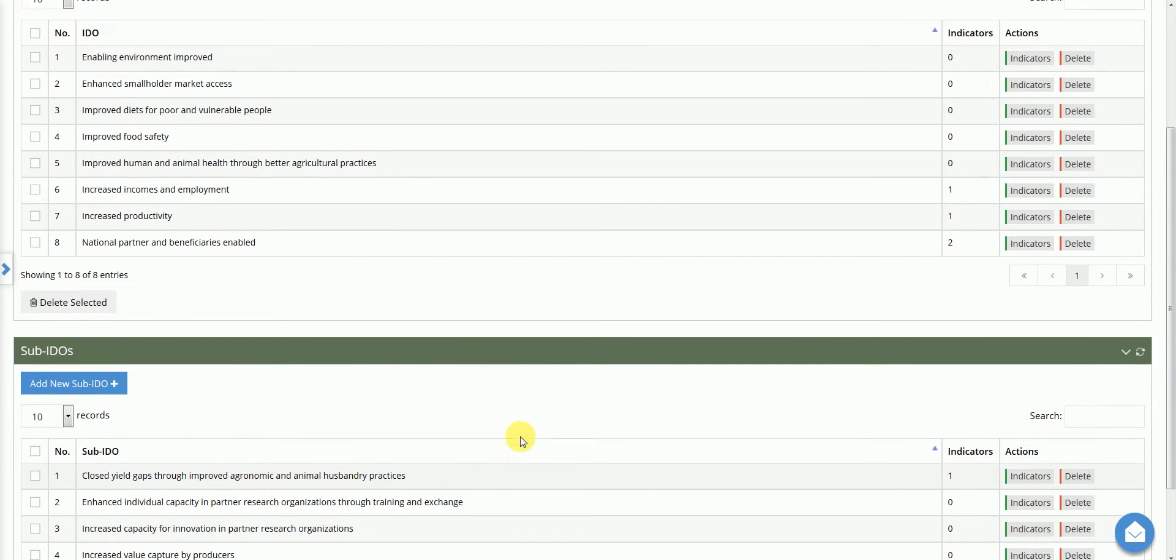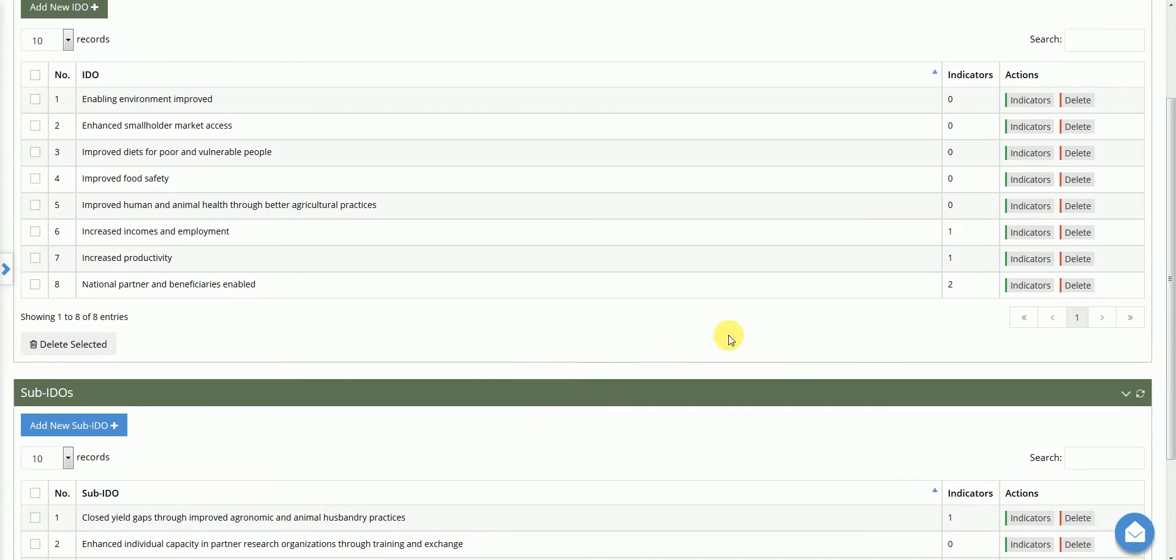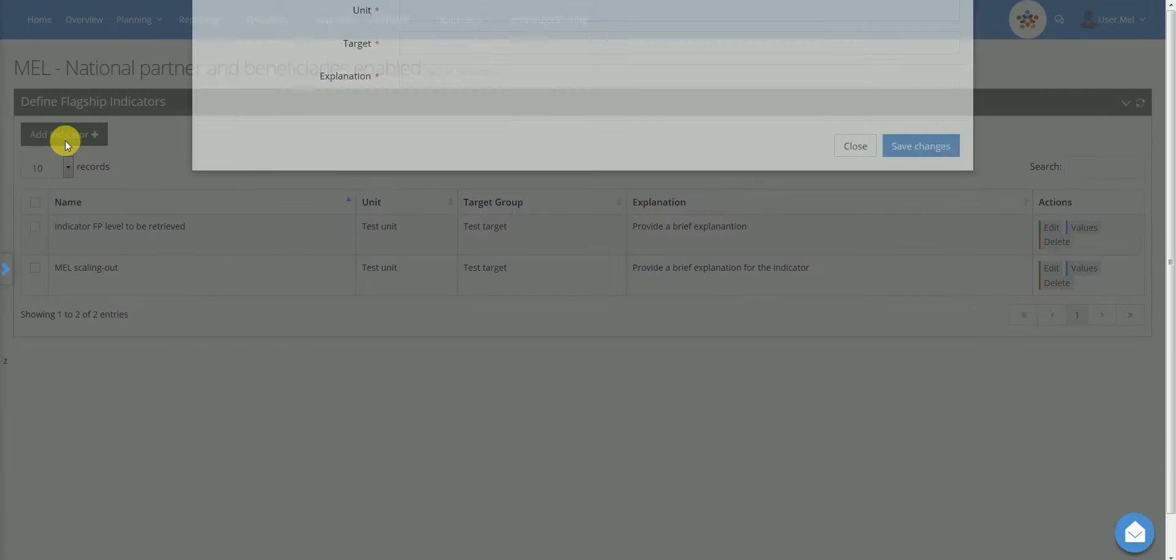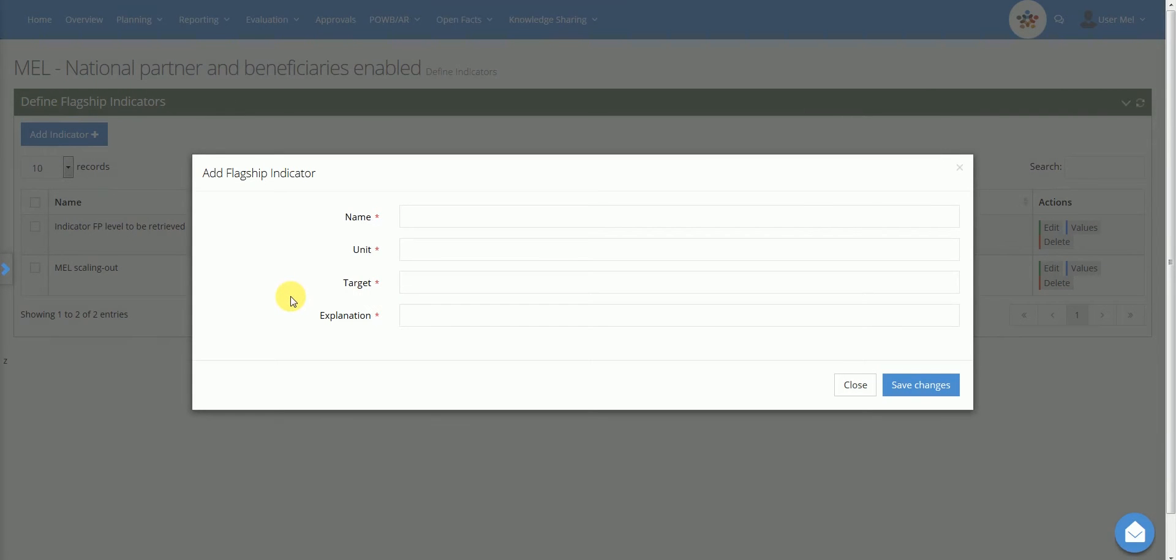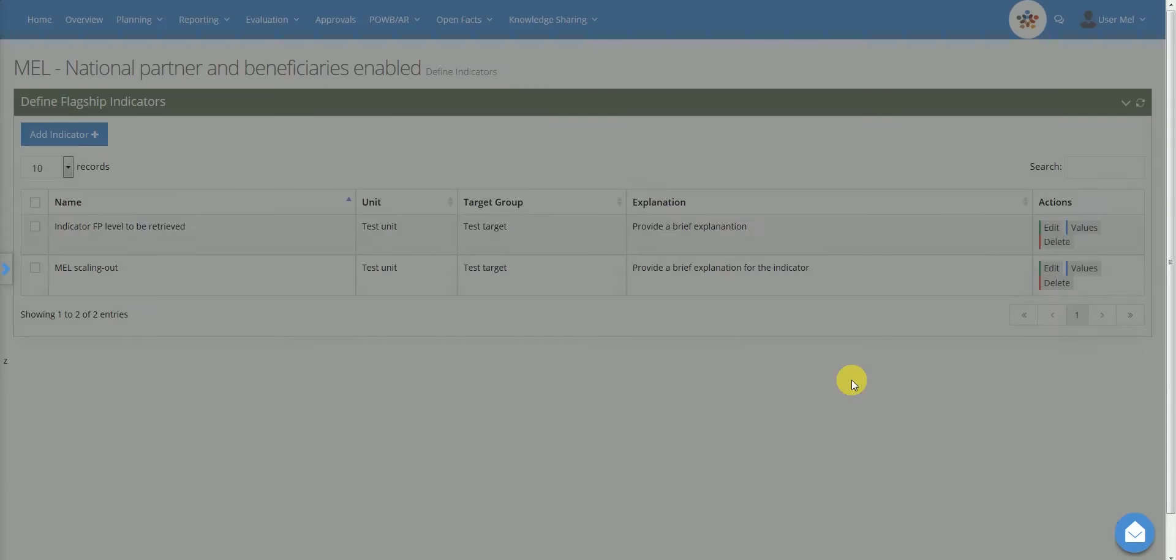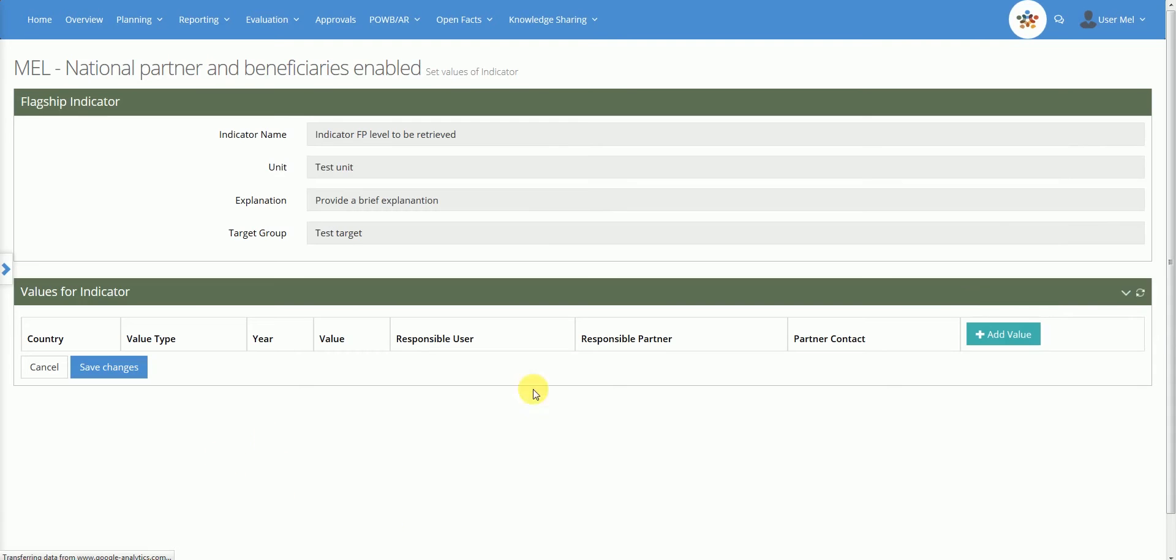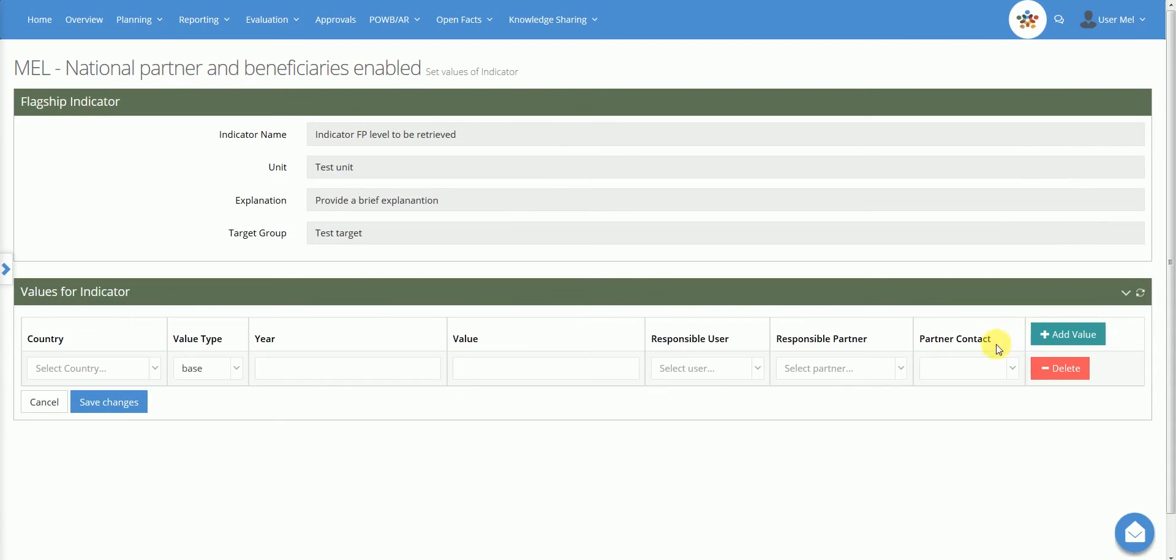The Indicators action allows the user to define specific criteria to evaluate the progress toward the achievement of the IDOs and sub-IDOs. To add a new indicator, select Add Indicator in the top left corner of the page, then provide the following data: name, unit, target and explanation. When you have registered new indicators, you may specify baseline and target values by country and by year and define reporting responsibilities.